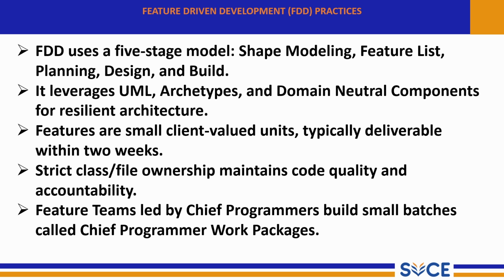Features are small, client valued units typically deliverable within 2 weeks. In FDD, the main focus is on delivering the features that give value to the customer. Each feature is small, meaningful, and can be completed quickly. Usually within 2 weeks, this allows continuous delivery and fast feedback.